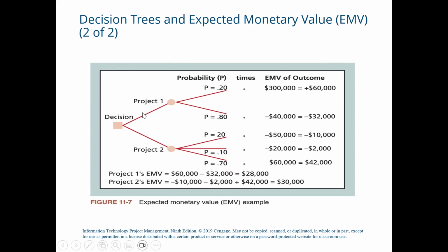Suppose, from our opening case, the Cliff Brands firm was trying to decide if it should submit a proposal for project 1 or project 2, or maybe for both projects or neither project. The team could draw a decision tree with 2 branches as shown in the figure, project 1 and project 2. The firm could then calculate the expected monetary value to help make this decision.